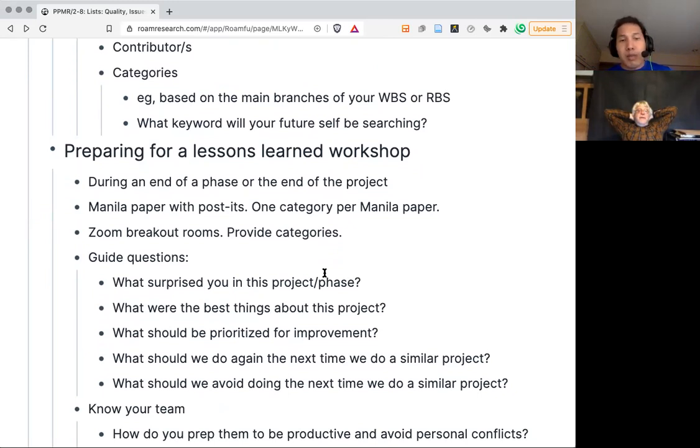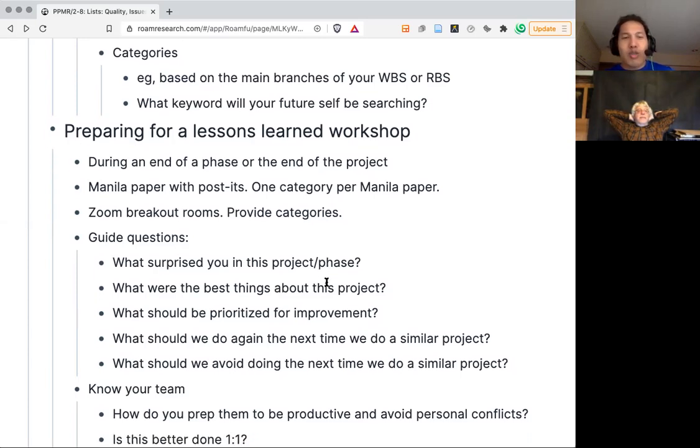Also, what are the best things about this project? And then, at least here in the culture I work in, people are so hesitant to give negative feedback. So we have to couch the question in softer language, like, what should be prioritized for improvement in this project, or what should we avoid doing the next time we do a similar project.